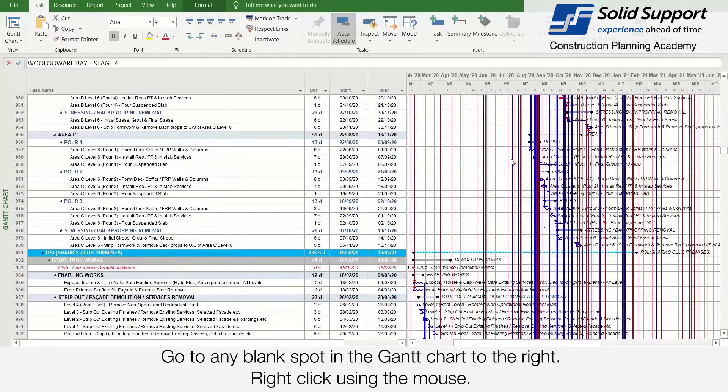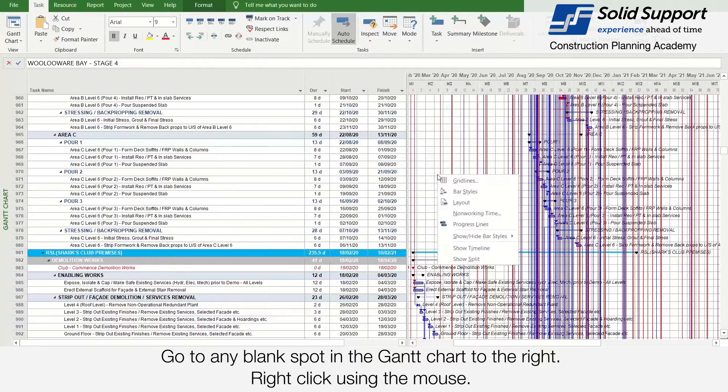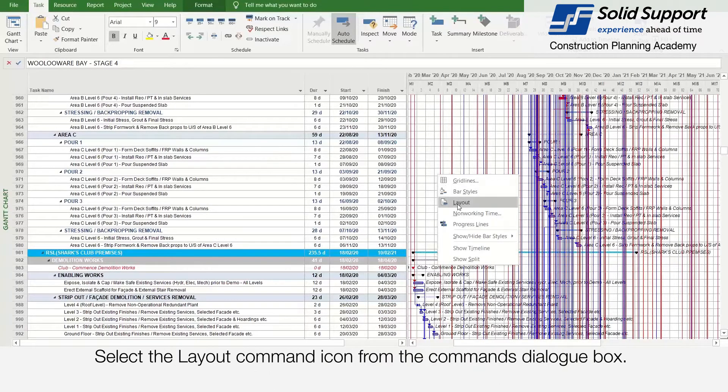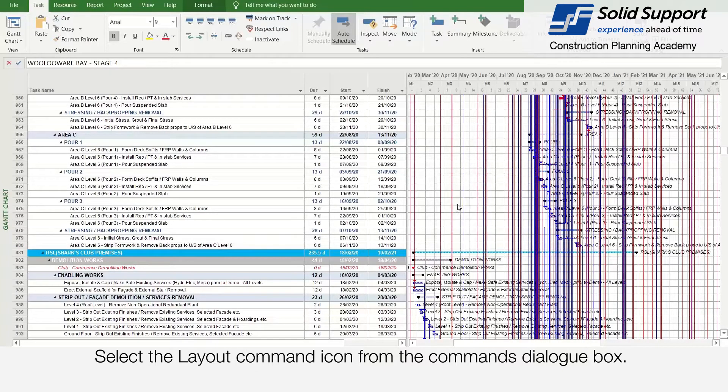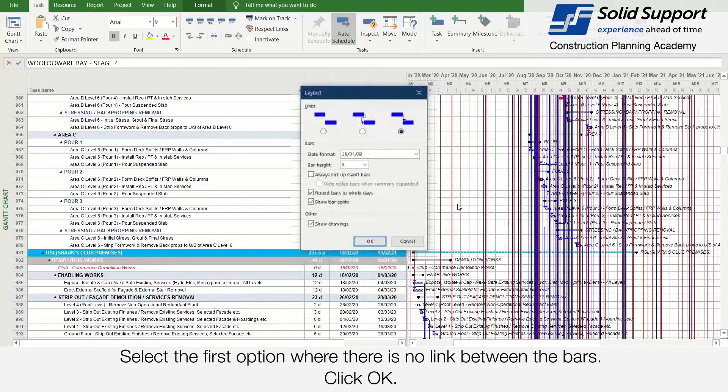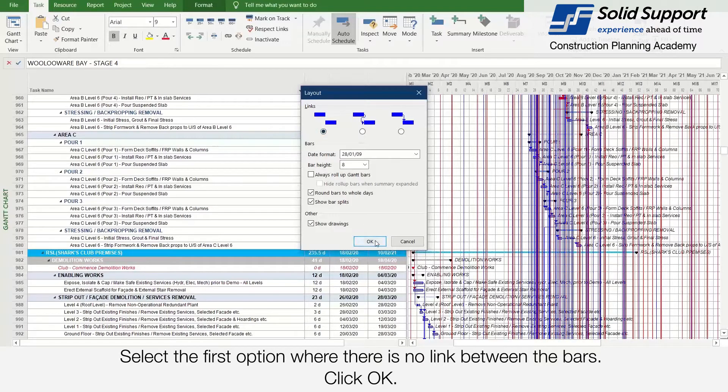Go to any blank spot in the Gantt chart to the right, right-click using the mouse, select the layout command icon from the commands dialog box, select the first option where there's no link between the bars, click OK.